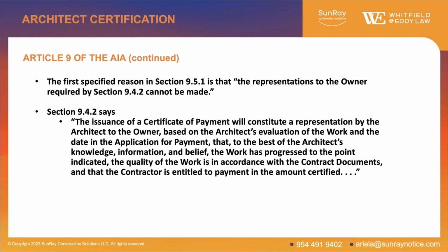And so that points to where you have to identify in your pay app the percent of a specific area of work that's completed. So if you have 50% in your pay app and the architect says, I don't think it's 50% completed, well, then that percentage is going to get reduced. So if the architect's not going to agree with you on the percent complete, that can be a basis to withhold the certification or at least reduce the amount you requested. The next one is the quality of the work.